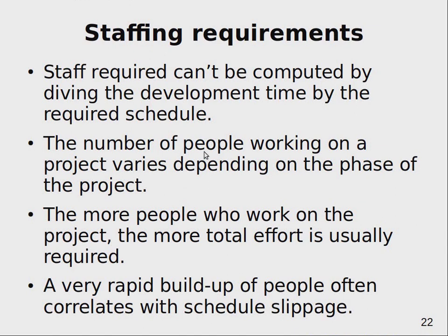And so you need to remember that usually the beginning and end of the project are hard to parallelize. Usually you can get the biggest number of busy people somewhere in the middle of the project, and please don't plan that you will get more people working concurrently, in parallel, at the end of your project. You may assign more people at the end of the project, but then definitely they will not be fully loaded, they will not be efficient, etc.